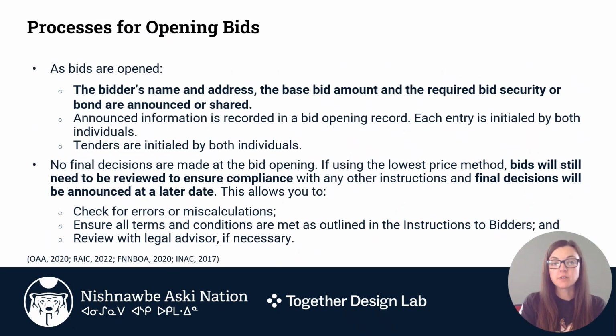As bids are opened, the bidder's name, address, the base bid amount, and the required bid security or bond are announced or shared. Announced information is recorded in a bid opening record. Each entry is initialed by both individuals. Tenders are initialed by both individuals as well.